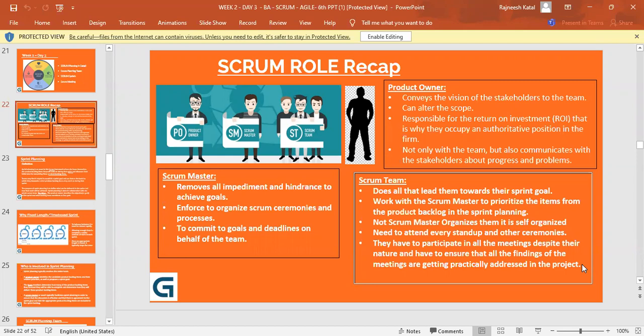Second, the maximum duration of this meeting is supposed to be 15 minutes or so, not more than that. So it's not like other lengthy meetings where things go on and on and on. Everybody gathers, everybody has a limited amount of time, and you have to share. So what do you have to share? You have to share 3 things and only 3 things.